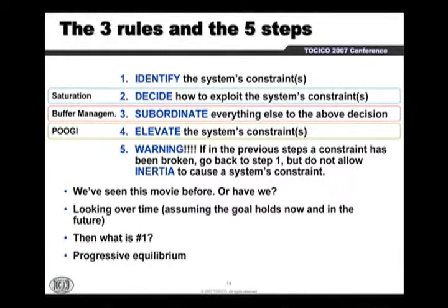So you choose some sort of guidance for your constraint, and then you fix it through your planning and manage it according to that. So that's the key for simplified drum-buffer-rope, for instance. Even if you have a bottleneck inside the house, you can still treat it as if the market is the only constraint, because you can also protect this bottleneck by your decisions on how to exploit and how to subordinate all the systems to that.